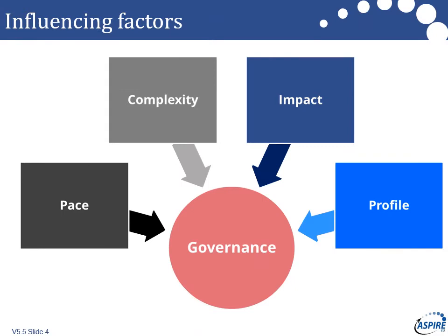When we are designing governance, there are a number of factors that we need to consider. First of all, pace. How fast is this program, or project, going to be moving? If it's up against very tight deadlines, then you need to consider that. There's no point in having a heavy committee structure when decisions need to be made really quickly.